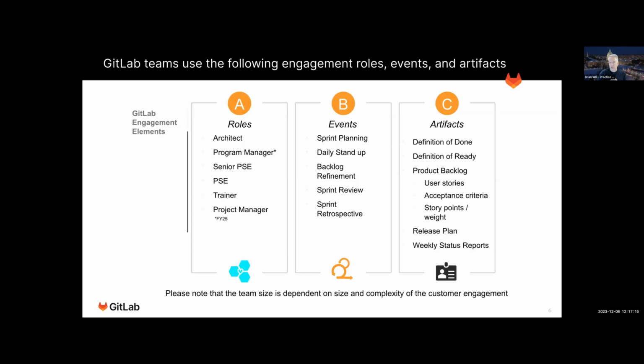You want to look back and say, how can we actually improve our lives going forward? If it's a larger engagement with multiple sprints, retrospectives per sprint makes sense. If you don't, then very often at the end of the engagement or the end of a deliverable, it makes sense to have a retrospective overall.